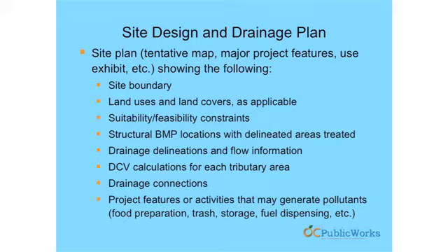I will note that this map could become more detailed and more refined as you move from a conceptual to a final WQMP. The conceptual plan might be able to just call out an overall drainage management area and define the amount of DCV that drainage management area will eventually provide in a number of systems. But then at the final project plan, that drainage management area will need to be diced up into the tributary area to each of these systems, and the specific sizing calculations will need to be provided for each of those systems.